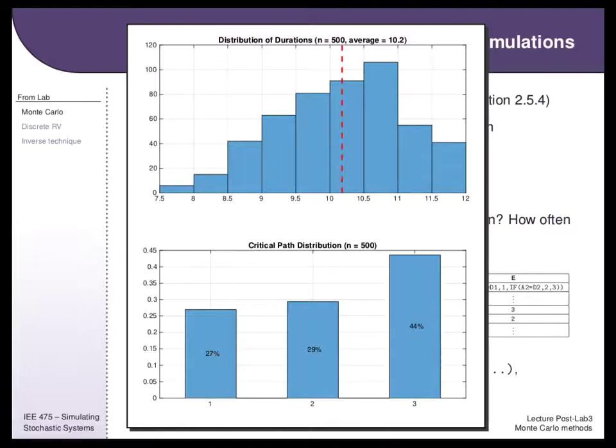And we talked about a rough, hand-wavy reason for that, but basically, because we're taking the max, you have to get really, really lucky to ever be less than the max, because it's more common that one of your 3 paths is going to be over the mean. So, even though the mean is 9, in order for the max to be less than 9, all 3 have to be less than 9. And it's going to be much more common that at least one of the 3 is more than 9, and that's what shifts this thing over so that your average is more like 10.1.